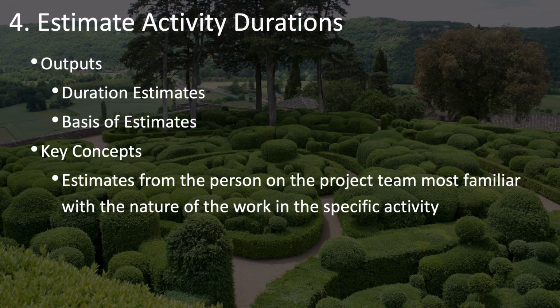One of the key concepts you should keep in mind as you have durations of activities estimated is that these estimates should come from the person on the project team who is most familiar with the nature of the work in these specific activities. That way, you will get estimates that are much more reliable. If you have someone else estimate them, they should at least be someone who is familiar with this type of work. But it's even better if you can have the people who will be working on it do the estimates.